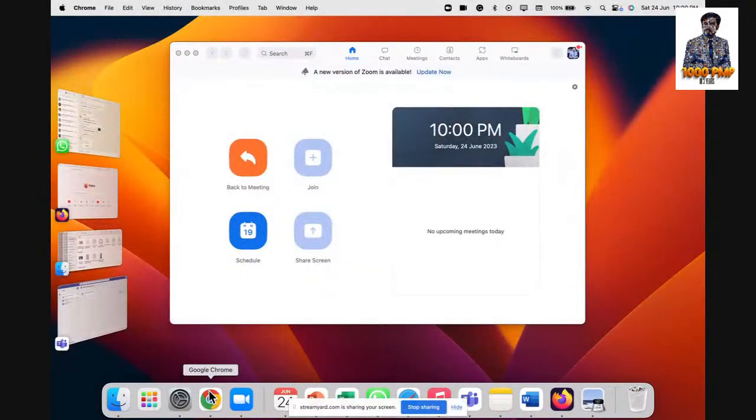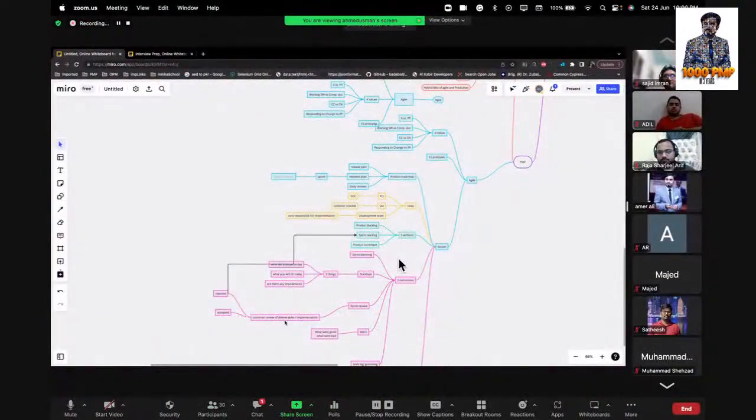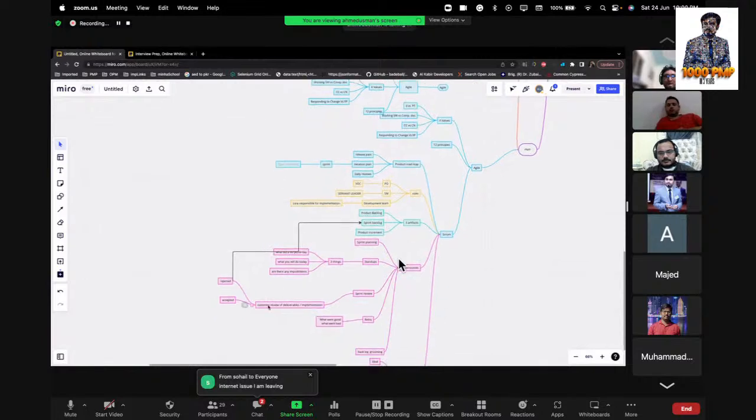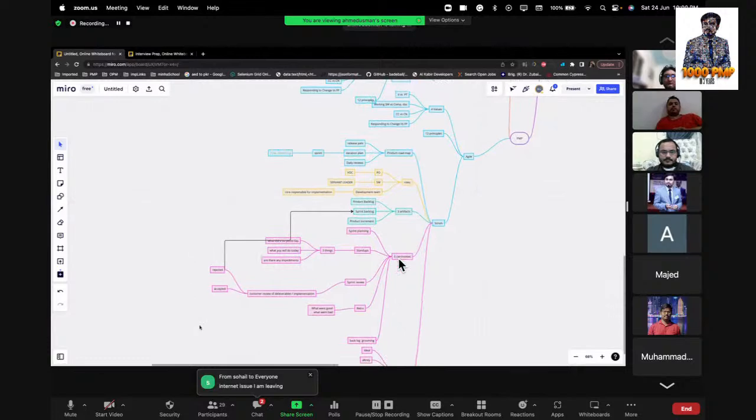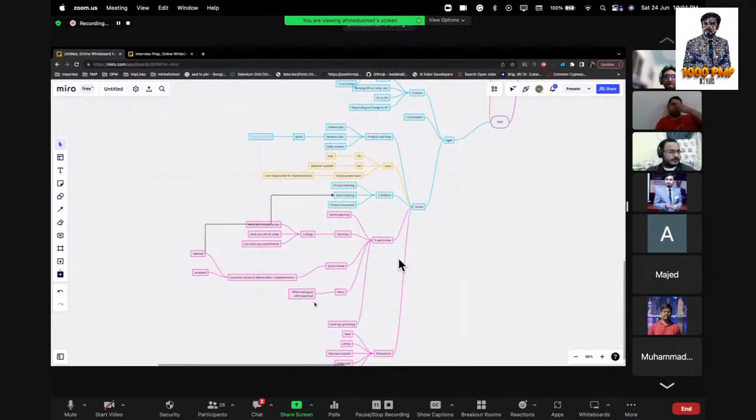In the review, we review the deliverables, and the customer is also part of the deliverable review meeting. If something is rejected, it goes back to the sprint backlog. In case of acceptance, we have an increment to the project, which we should have written. We haven't written that, but retro is an analysis of what went well and what went badly. The stages are also there.